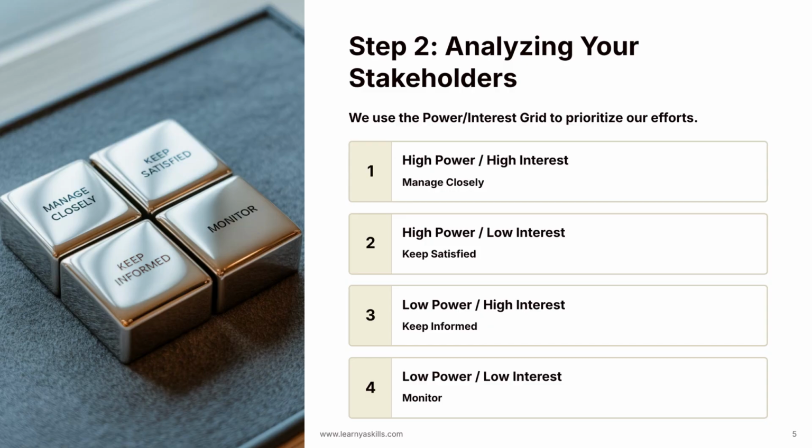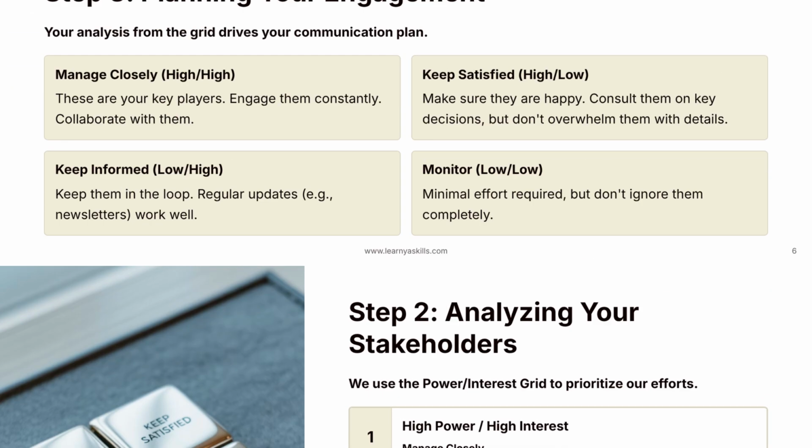Stakeholders with high power and high interest are your key players. You must manage them closely. Those with high power but low interest need to be kept satisfied. Those with low power but high interest should be kept informed. And finally, those with low power and low interest simply need to be monitored.